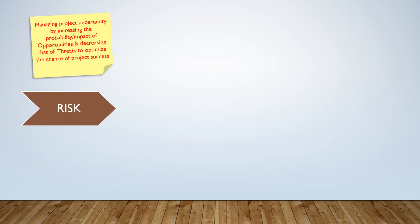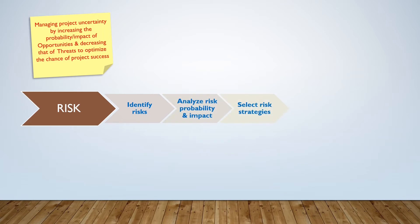Risk management is about managing project uncertainty by increasing the probability and impact of opportunities and decreasing that of threats, to optimize the chance of project success. To manage risk, the project manager must identify risks, analyze probability and impact, select risk strategies, implement risk strategies, and then monitor and control risk on the project.